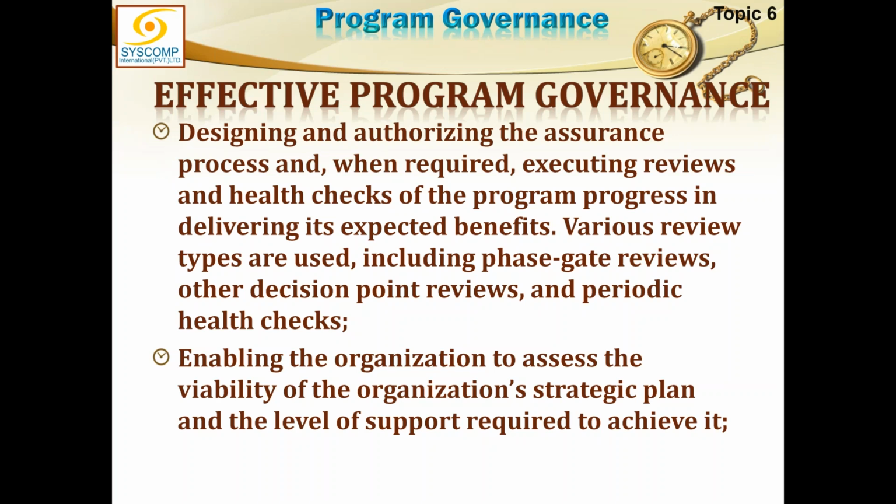So a health check is essentially done by a third party like the consultant I have mentioned, or any other body within the organization could be assigned this job. So these audits can be done, and these audits are directly under the governance. They are not under the program manager. The program manager is not responsible for periodic health checks, but he will facilitate them. But these people who are going to be doing the health check are not going to interfere with the working of the program. Rather, I would say minimal interference, if at all, should be there.